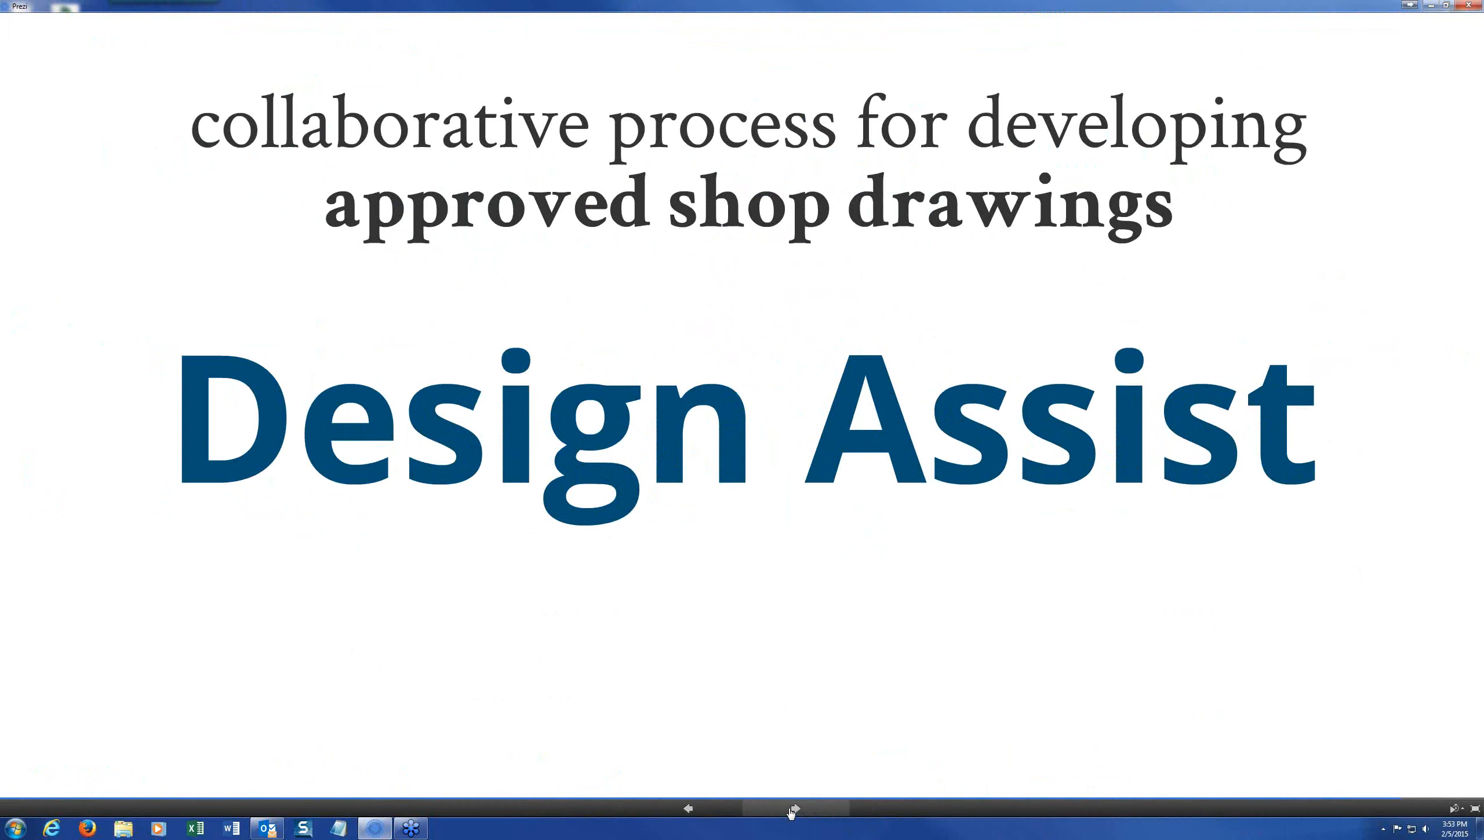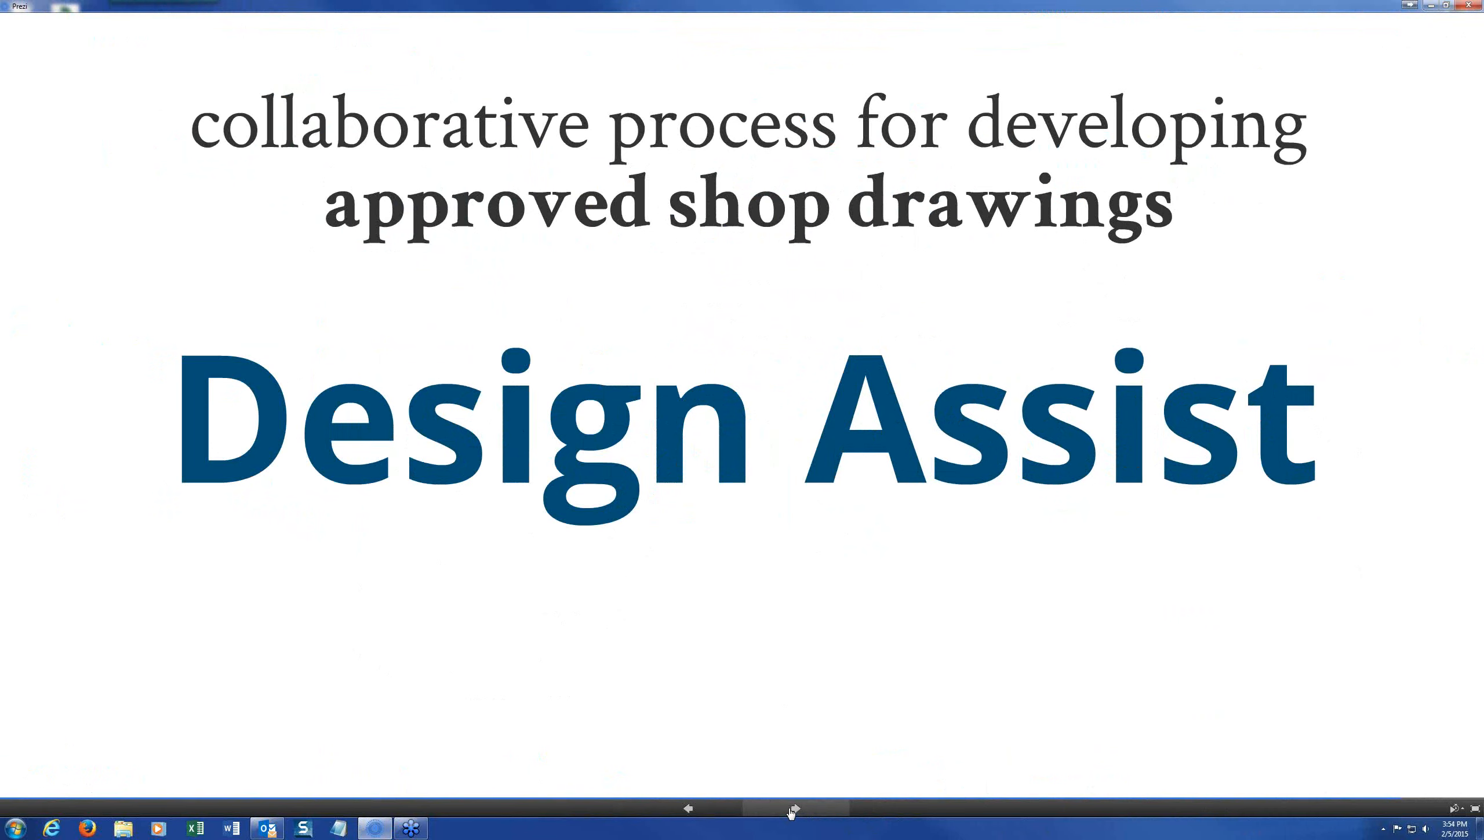That's frightening. But here's Bill Dubois, he stuck his hand up. Greta has a comment. She says maybe the code allows us to delegate aesthetic concerns, but how can anyone bid such documents? Perhaps we can defer aesthetic decisions such as color and pattern selection, but the general characteristic of these should be carefully documented and controlled by the architect as early in the design construction process as possible. Otherwise allowances or unit prices may need to be used to control costs due to the architect's later decisions or approvals. Well Greta I can say that in my experience on using aesthetic descriptions on these theme developments, which are granted not an ordinary thing, it's a matter of how much can I describe that is appropriate.